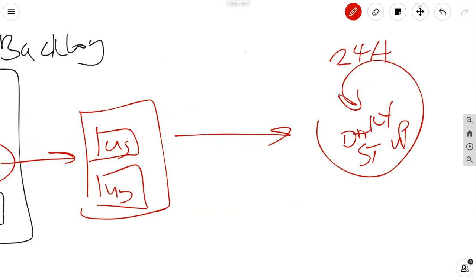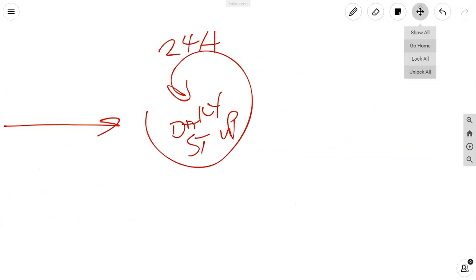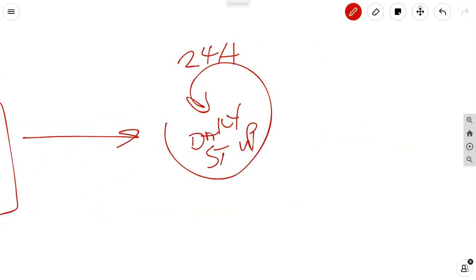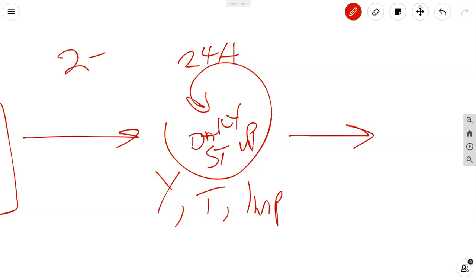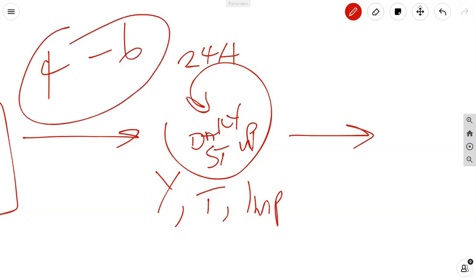And in the daily stand-up, you answer the 3 questions. What did you do yesterday? What are you doing today? And what impediments are in your way? How can I help you? When all that is said and done, the repeat, the sprints are 2 or 4, I should say. Some teams might do it in a shorter period, but it's really 4 to 6 in many instances, weeks. But it could be any duration. It really depends on the team. But ultimately, you're going to get this shippable product increment.